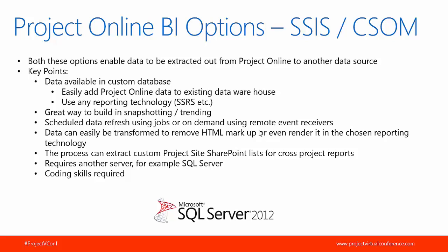With SQL Integration Services and CSOM, you can schedule the refresh of that data, so it can be on a SQL job, or you can call it from a Windows scheduled task. Or if you're using CSOM, you could even make it event-driven, so you could create a replica real-time reporting database for Project Online, but in SQL, so you've got full access to that data at the SQL level.